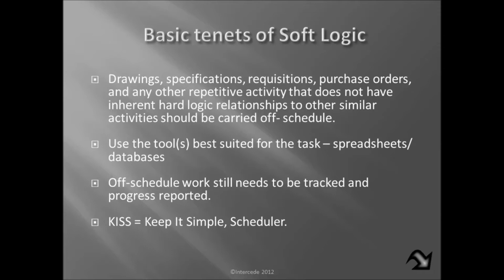So now with pipe, there is a certain sequence. You want to put the large bore in before you put the small bore, and if you have any HVAC duct or something like that, it should probably go in first too. Essentially large to small, and you want to have a point of departure or termination. So you don't generally install the middle without one of the ends. But beyond that, it doesn't really matter, especially if you were to do this in the pipe rack, what you would install. And the thing to keep in mind here is use the tool best suited for the task.